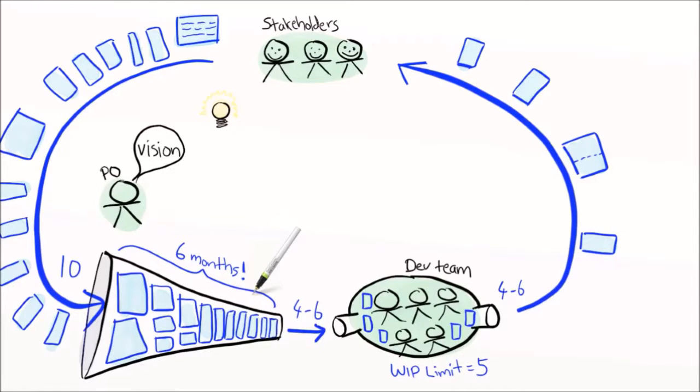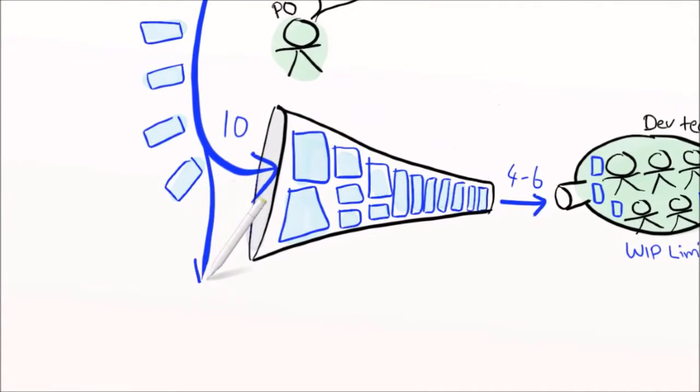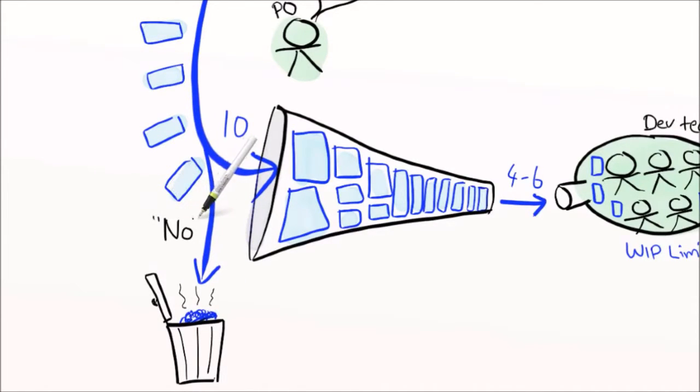How agile is that? So there's really only one way to stop the queue from getting out of control, and that word is no. It is the most important word for a product owner, and Pat practices it every day in front of the mirror. Saying yes to a new feature request is easy, especially if it only means adding it to an ever-growing backlog. The most important job for a product owner is to decide what not to build, and take the consequences of that decision.